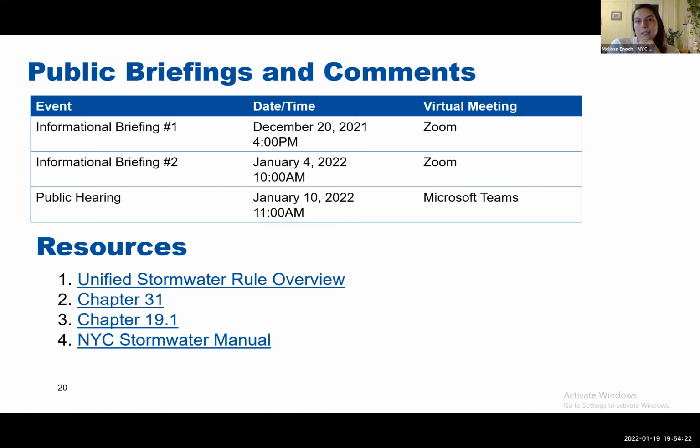And for the stormwater construction permit, DOB should come to us relatively early. DOB is also flagging any projects that meet our threshold, our soil disturbance or our new impervious area threshold. And we'll be finding projects on our own as well. But in theory, if someone doesn't come to us, they'll get flagged by DOB. And we also do all of the plan review and permitting for that.